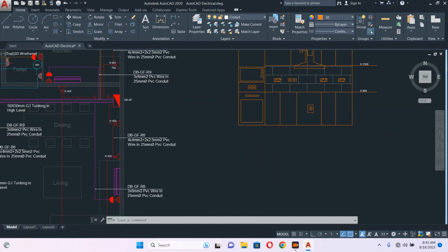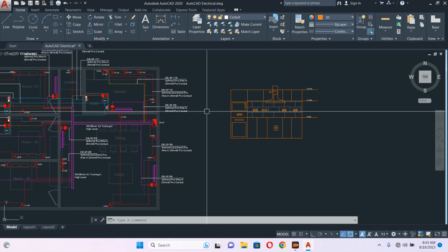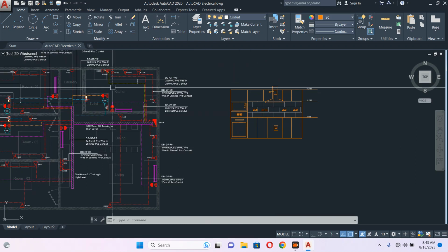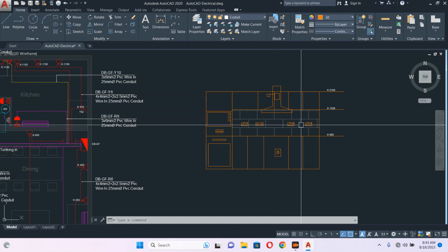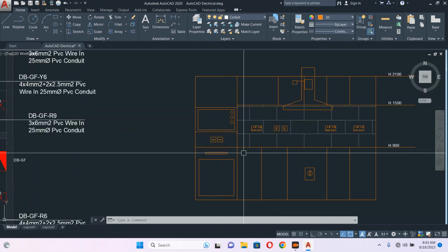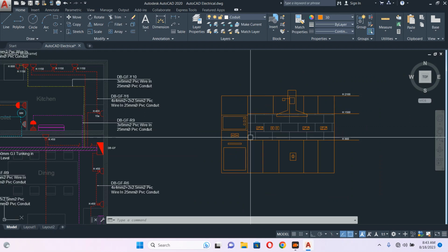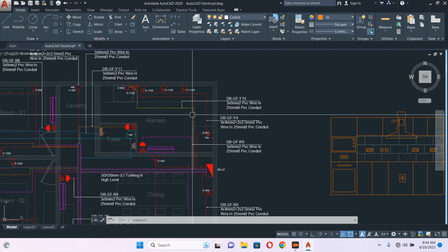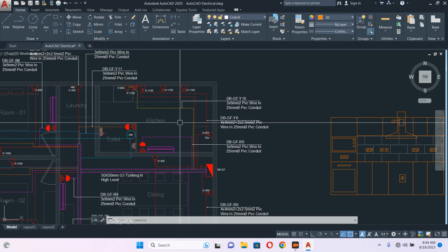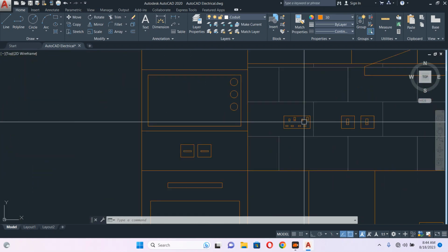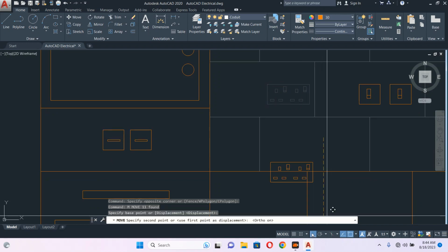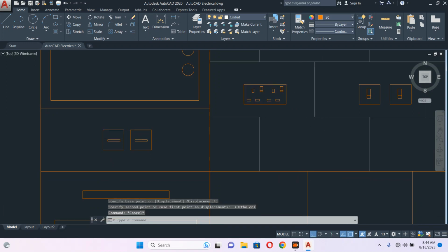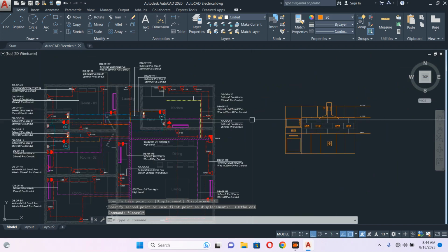So now I can tell you something related to RFI. If you don't find this arrangement, like the cabinet, tile, this oven and everything, you can make an RFI: we need this information correctly to provide our outlet. This is called an RFI, we can make it. And remember, the tile people will always reach out to you for this drawing, so you need this one.